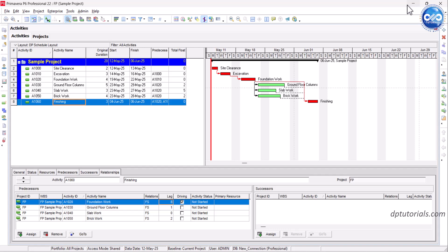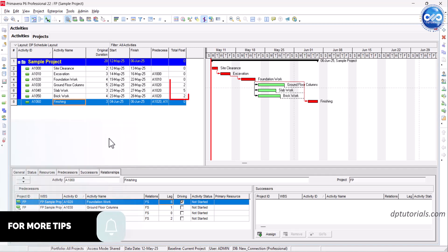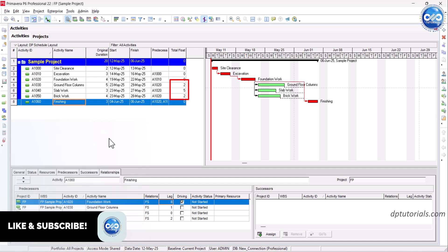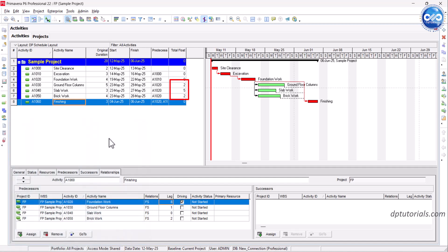Let's look at a sample project. In this example, activities A1000 to A1020 and A1060 form the critical path since they have zero float. Activities A1030 and A1050 have two days float, meaning they are near critical. A1040 has five days float, meaning they are low risk right now but still important to monitor.